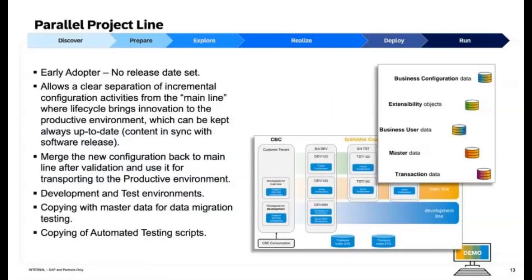Parallel Project Line: The enhancements for customers in the early adopter program for parallel project lines allow for a clear separation of incremental configuration activities from the main line, enabling the productive environment to remain up to date with the latest software releases. After validation, new configurations can be merged back into the main line and transported to the productive environment. These enhancements also include features for managing development and test environments, copying master data for data migration testing, and copying automated testing scripts.